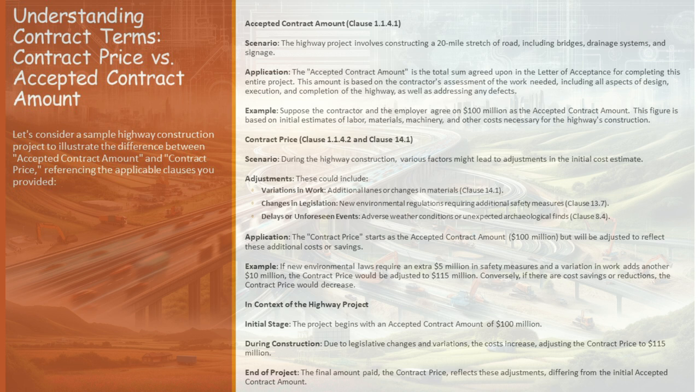They reflect the evolving needs and demands of the project. In our case, this variation adds, let's say, an additional $10 million to our initial accepted contract amount. The contract price now tentatively stands at $110 million.